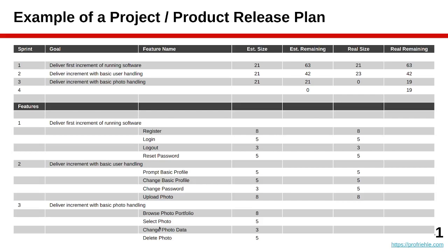So how does it look like? Well, you look at the total number of sprints you have to plan for, you give them a goal, and you put in the key features that you expect fall under that goal, and you estimate either yourself or with the help of a developer, you do a rough estimate of the complexity or size of these features and keep adding things up. You can see it here.